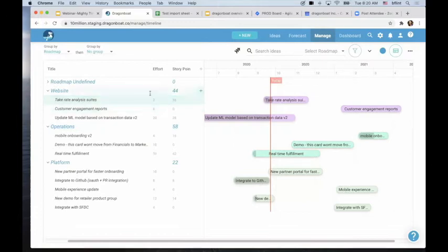This is your top-down planning, and maybe your dev lead said this is going to be 6 points, 18 points, whatever. And then this is after the epics are broken down into stories. Then you add those up, and if these two things are different, you may want to make some adjustment. For example, it's a 16, not a 2. Maybe I need to make an adjustment to make the timeline longer. And so then you can visualize how it may look.